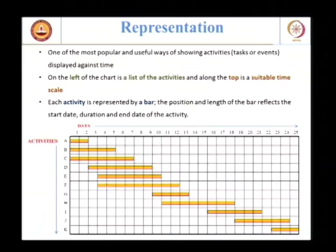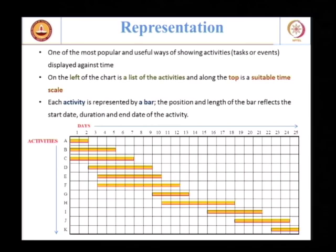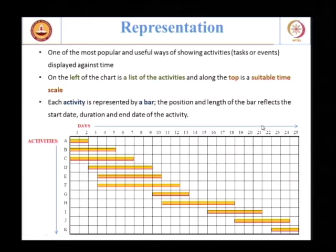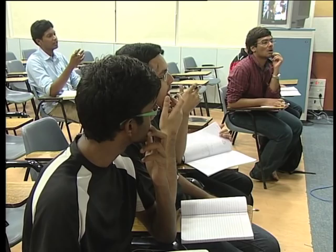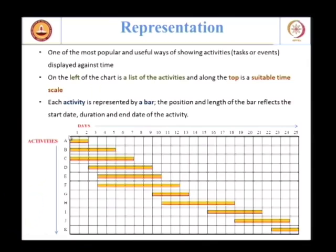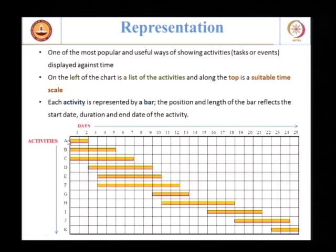When we get into the representation of the Gantt chart, you are familiar with it in some form. Just look at the simplicity — we have activities listed on the left of the chart and time on the top. The work breakdown structure from the last lecture allows us to identify all the activities involved. We assume some kind of activity identification exercise has taken place before the bar chart is made to list the activities.